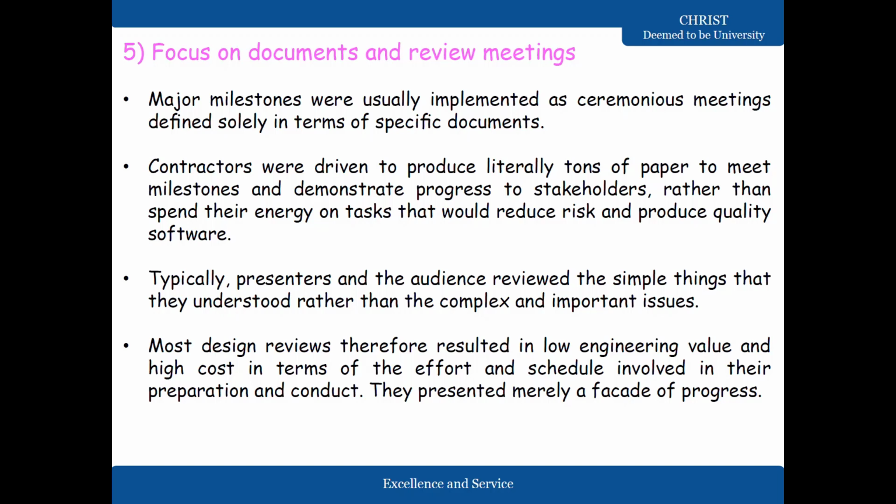Okay, so the major milestones were actually implemented as ceremonious meetings, defined solely in terms of specific documents, but they don't actually perform when it comes to implementation. Implementation is given more importance. So contractors were driven to produce literally tons of paper to meet milestones and demonstrate progress to stakeholders, rather than spend their energy on tasks that would reduce the risk and produce quality software.